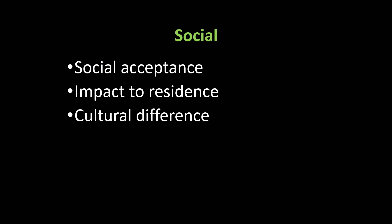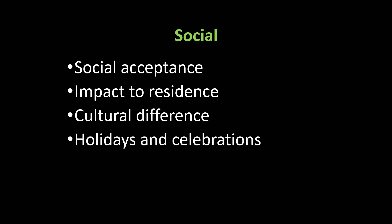Are you working in an environment or with nations that have different cultural views, such as women not being treated equally as men in some nations? Do they have a particular way of doing business? Do they celebrate the same events as you? What about accepted holiday or religious periods? When is the best time to release your new dancing Father Christmas robot? Your restaurant opening is planned for mid-May — that's right, in the middle of Ramadan, during which Muslims fast between dawn and sunset.